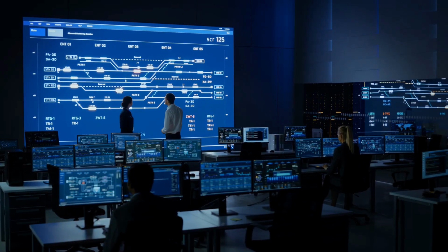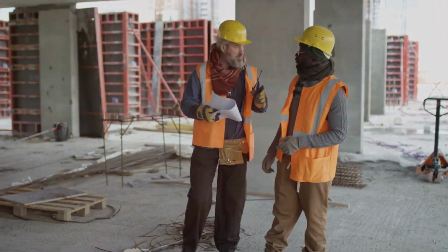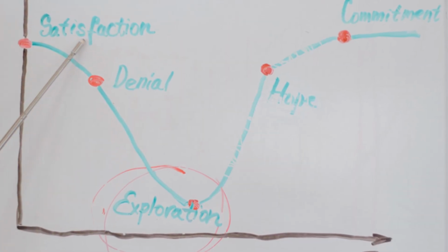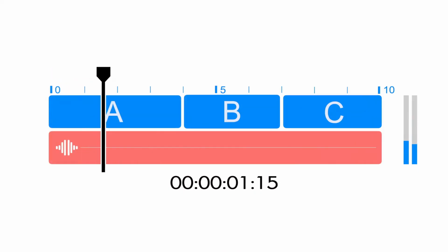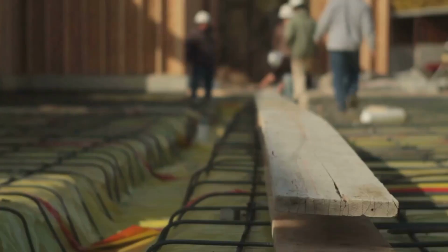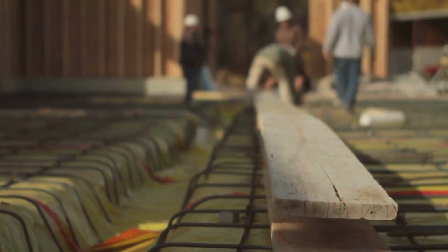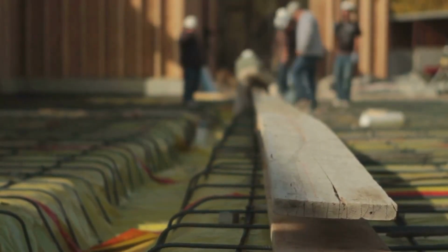Before the backward pass, understand its counterpart, the forward pass. The forward pass determines the earliest start and finish times for each activity. It begins with the project's start date and progresses chronologically. For example, in a construction project, laying the foundation depends on completing the excavation.